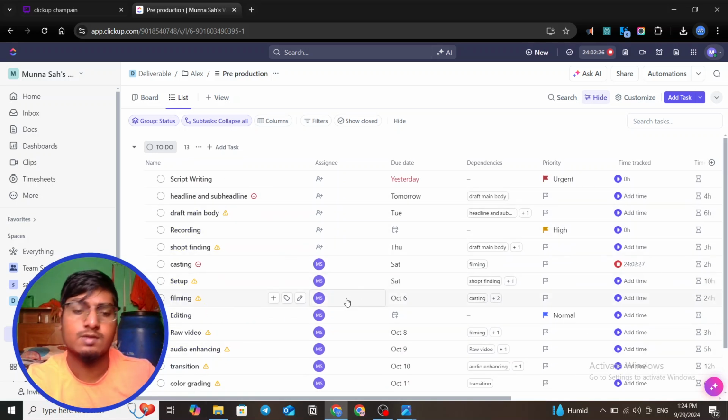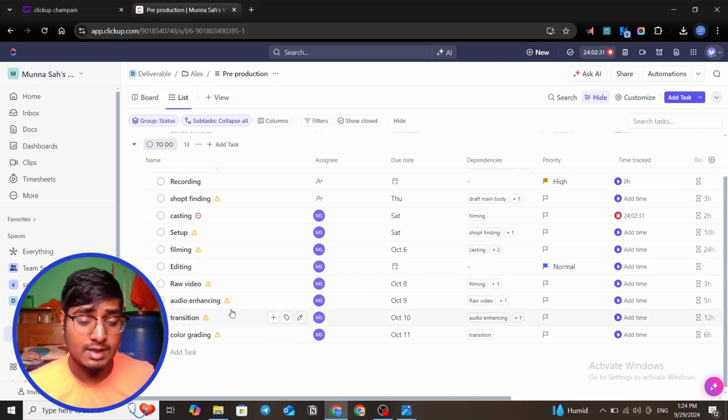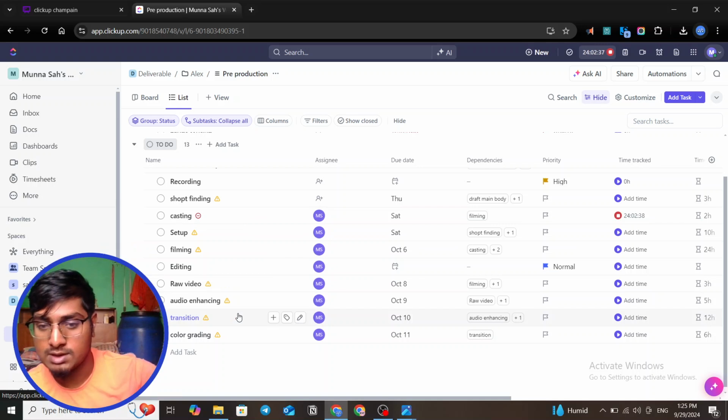If it is a 5-hour work, just make it in one task, one line. If it is 7 days, make a pre and post list. Divide the tasks and group them, so we know what we have to do.